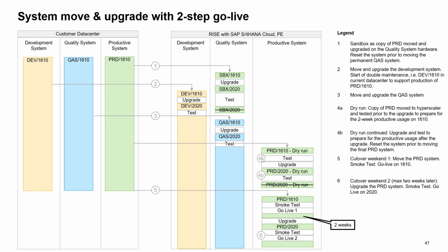The limited maintenance policy basically affects the migration of the productive instance of a nearly to be or already out of maintenance S4HANA system by mandating to have 2 productive go-lives once the productive instance is migrated in the Cloud Private Edition. The first go-live will have to be in the original version and will only cover the migration to the cloud, lift and shift, whereas the second go-live will be for the upgraded productive instance. These 2 go-lives can be spaced by at most 2 weeks.